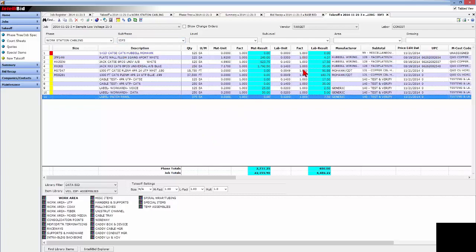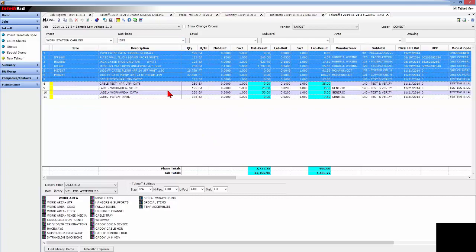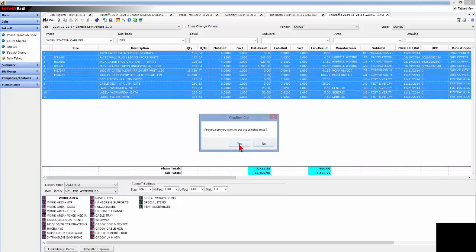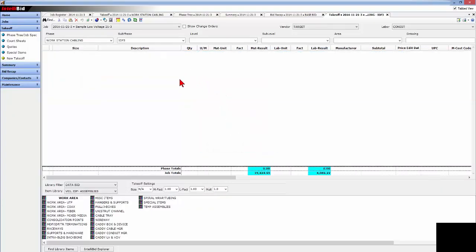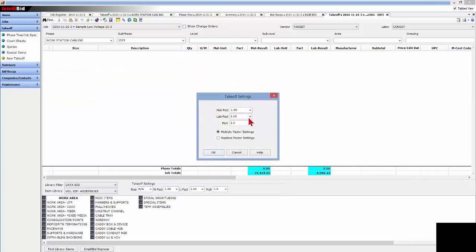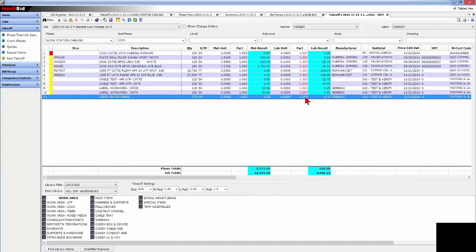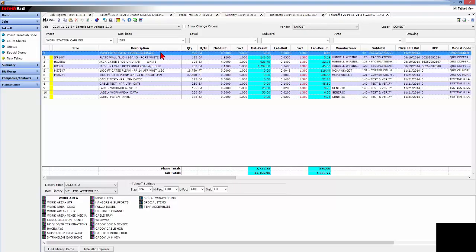In fact, the factor that I want to put on this will warrant me, just with a quick cut and paste here to show you quickly, is that I believe, without having a system know everything about the labor, I'm looking at the occupancy of a floor and need to make some further judgments from the labor units that are in the system, and I decide to look at the entire floor as a difficulty overall for every piece of the installation.